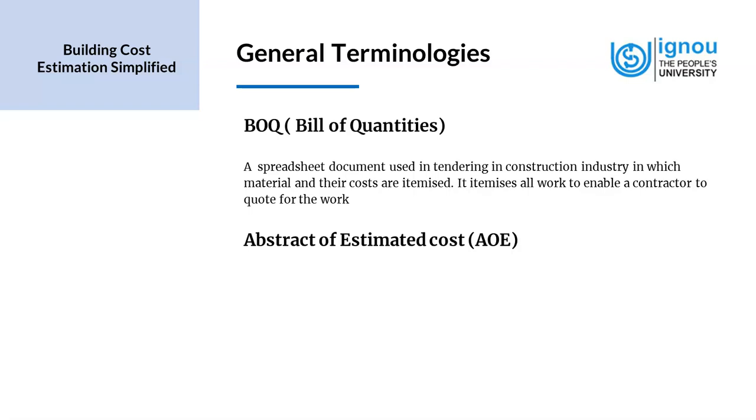So we itemize the huge work into different parts as per the material or the service that has to be done. Now, the rate column is usually left blank. We only provide the quantity to the contractors who are bidding, and they can fill in their rates and then come up with the total amount. And this becomes a bid from the contractor. So it is an Excel sheet, and this is provided during the tendering process.